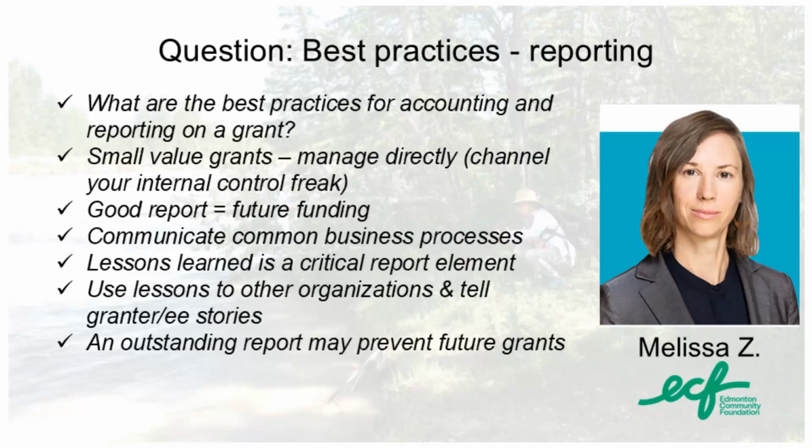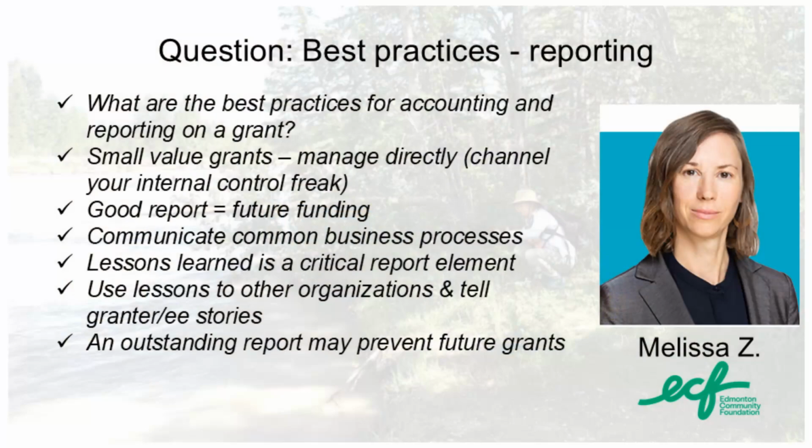First, one of the things that we really appreciate seeing in the report is the lessons learned section. So we take those lessons and we apply those to support other grantees. And so we'll hear the themes that technology upgrades often take longer than expected and have cost overruns. That helps us when we're talking to a future grantee who's looking to perhaps do something that's similar around a technology update, a database management system, capacity building. We can bring in those lessons that organizations in the same community have gone through.